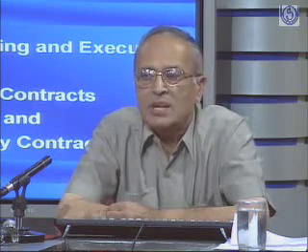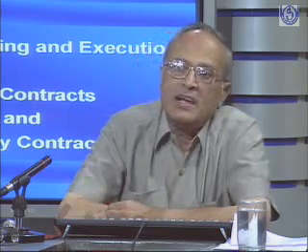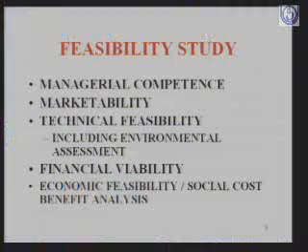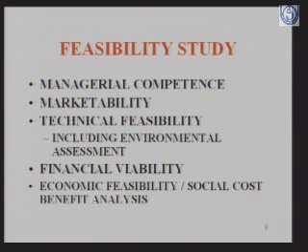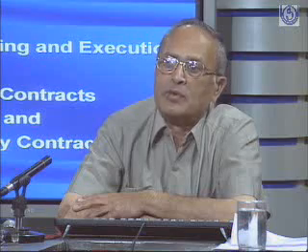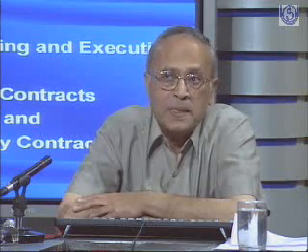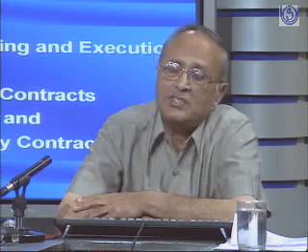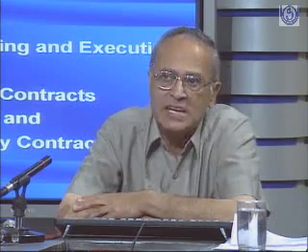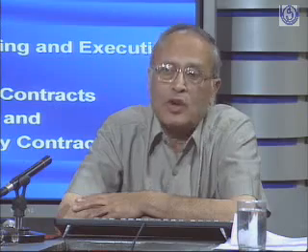Now if the project is financially viable, you have earlier listened to the point about economic viability. A project may be financially viable, because when I am looking into the financial viability, I am looking at it from the angle of the private promoter. If, for example, I am taking up a whiskey project, it may be financially viable, it may be giving very good return to me in terms of profits, but it is not desirable from the economic point of view. If funds are limited, I would like to take up a project for the manufacture of cement or steel, rather than a project for the manufacture of whiskey. So I am looking at it from the economic benefits point of view.